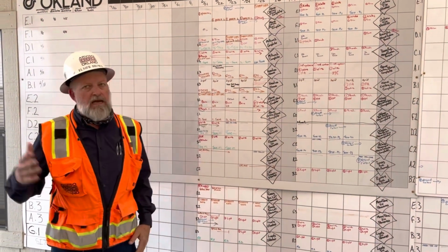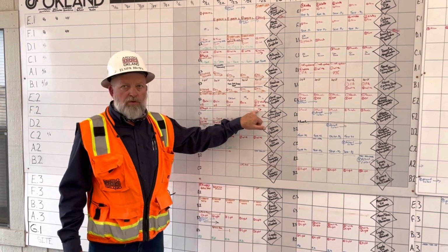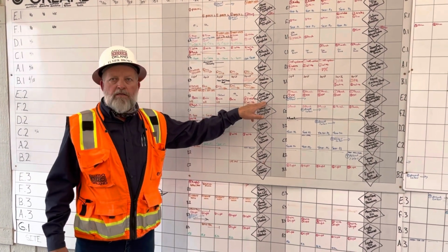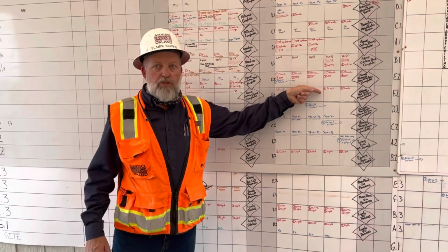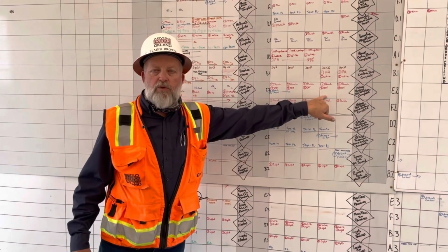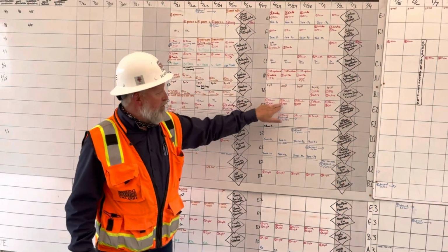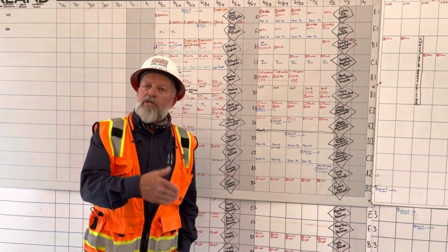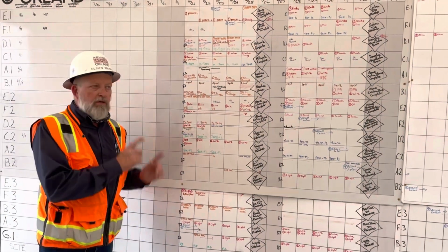Come Wednesday, he says, I'm not gonna make it. Well, you need to work 10 hours a day for the rest of the week. You can work Saturday. We don't want your problem this week to slip into next week, because we already have next week's activities planned out for these guys you're using here. They're already committed somewhere else. So we don't want them to be still taking care of last week's work next week.